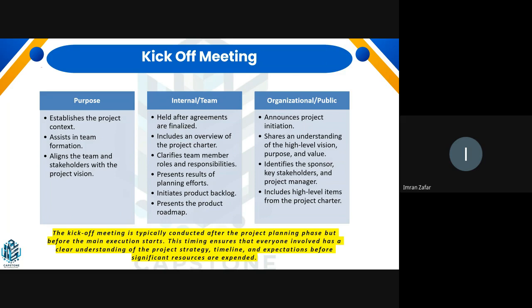This is something that usually happens, that we miss some stakeholder and they are identified later on, and then it becomes a problem, because now maybe you have to modify your plans, or modify your overall scope as well. So this is very important, that after initiating the project, you need to identify all your stakeholders, and then you need to engage with them to move forward with your planning process.